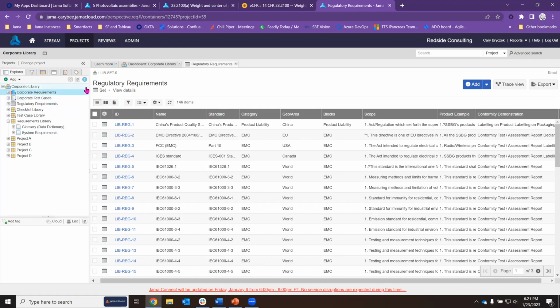That's why I had the two matrices. I had the one where management said these standards and regulations you've got to show compliance with. And then at the project level, they further decompose those. Are these requirements on my processes? Are these requirements on my testing? Are these requirements on my product itself? And then they could further assign those.